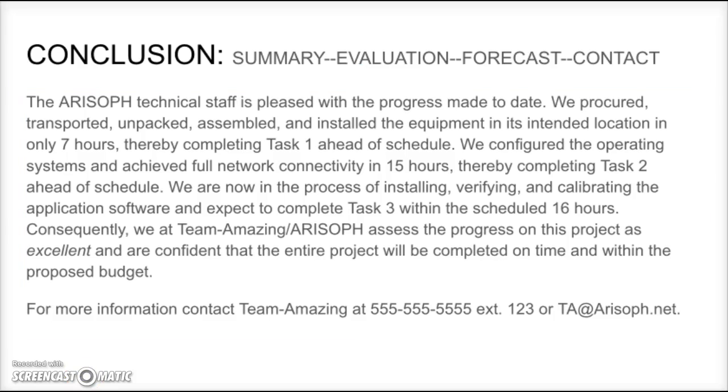Okay, here's the sample conclusion. Again, look for the summary, the evaluation, the forecasting statement, and the contact information. The Airsoft technical staff is pleased with the progress made to date. We procured, transported, unpacked, assembled, and installed the equipment in its intended location in only 7 hours, thereby completing Task 1 ahead of schedule. We configured the operating systems and achieved full network connectivity in 15 hours, thereby completing Task 2 ahead of schedule. We are now in the process of installing, verifying, and calibrating the application software and expect to complete Task 3 within the scheduled 16 hours.